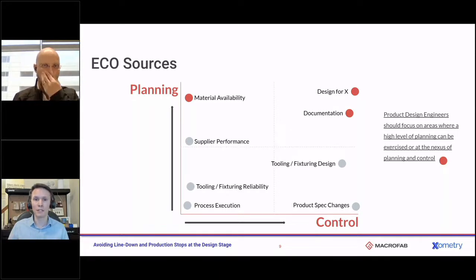When you talk about supply chain resiliency, just say, hey, I have this product, I need it made, my source is kaput for whatever reason. There's a natural weather event, something closes down, global pandemics. One of the biggest challenges that we saw even in the last 2 years was that people who needed products didn't have the fully spec'd out technical documentation. It was kind of lost in tribal knowledge or held somewhere else, even with personnel that may no longer have been with that company. And that leads to huge bottlenecks and delays and almost having to reinvent a lot of this. So it's not just starting with documentation, but it's diligence, creating that virtual data package, if you will.